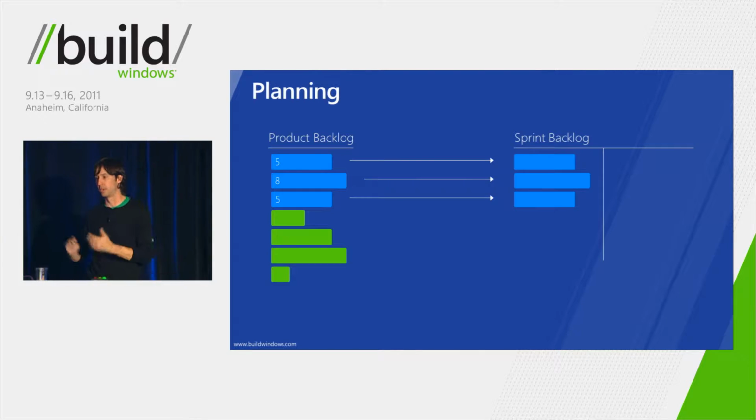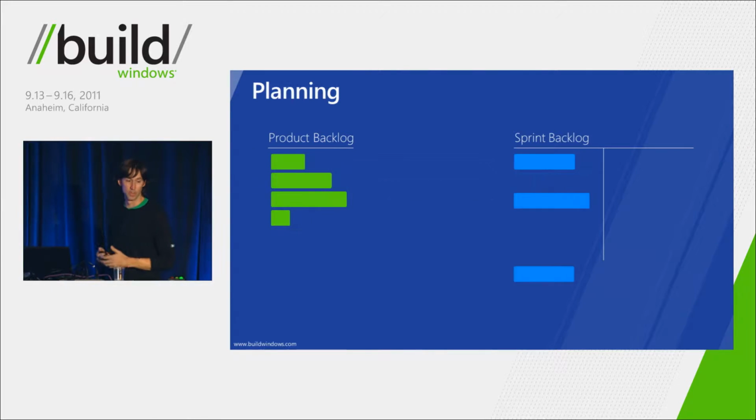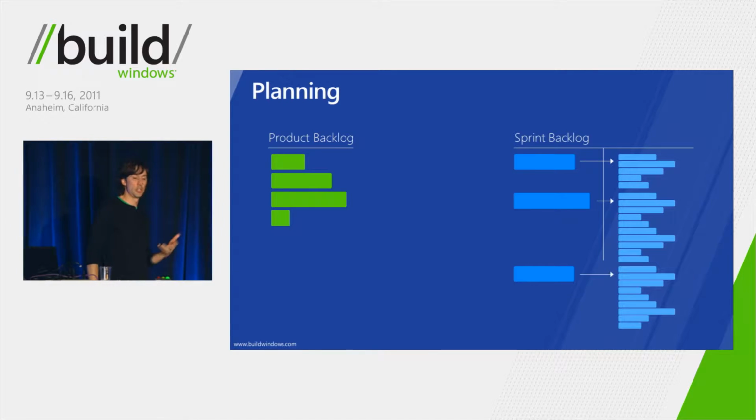And we decompose them into a list of tasks that represent the real work, right? So each of these stories turns into a task or a set of tasks. And those tasks, again, are adding the stored procedures, testing the database tables, actually writing the code, the implementation. And this is very, very important.